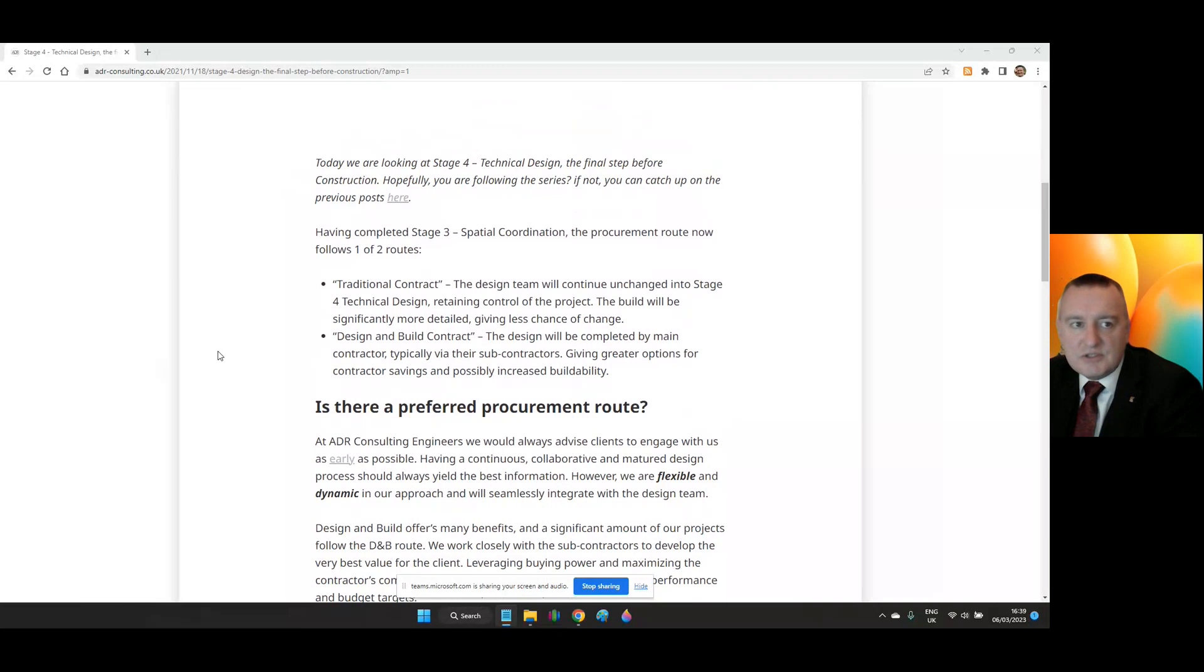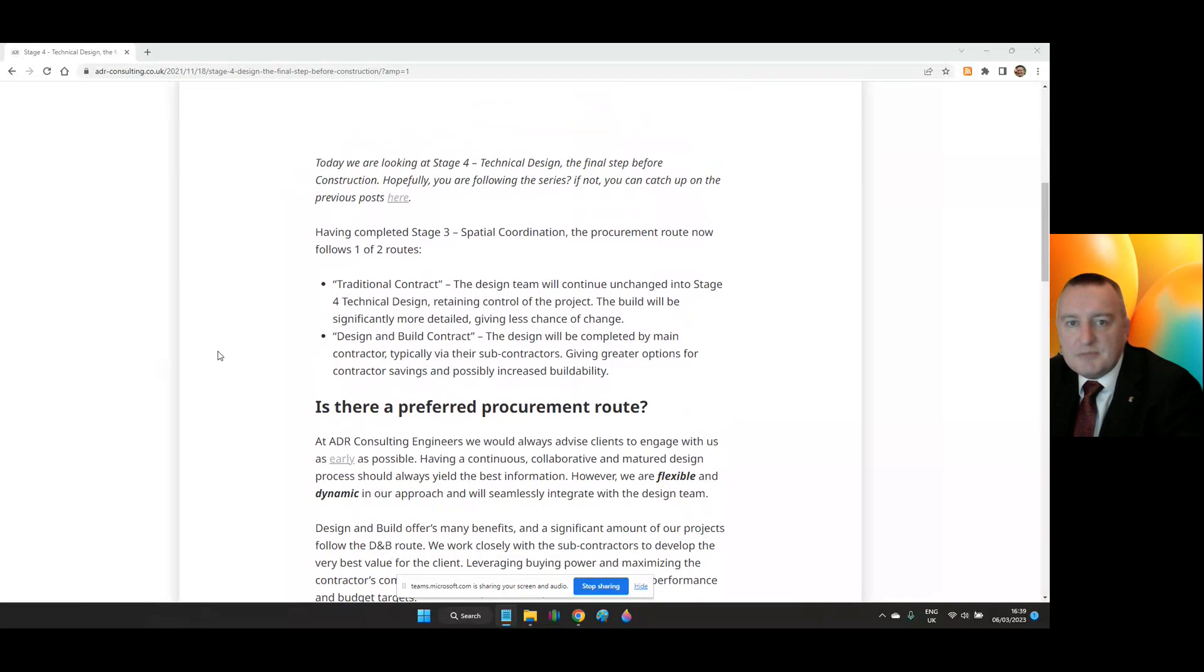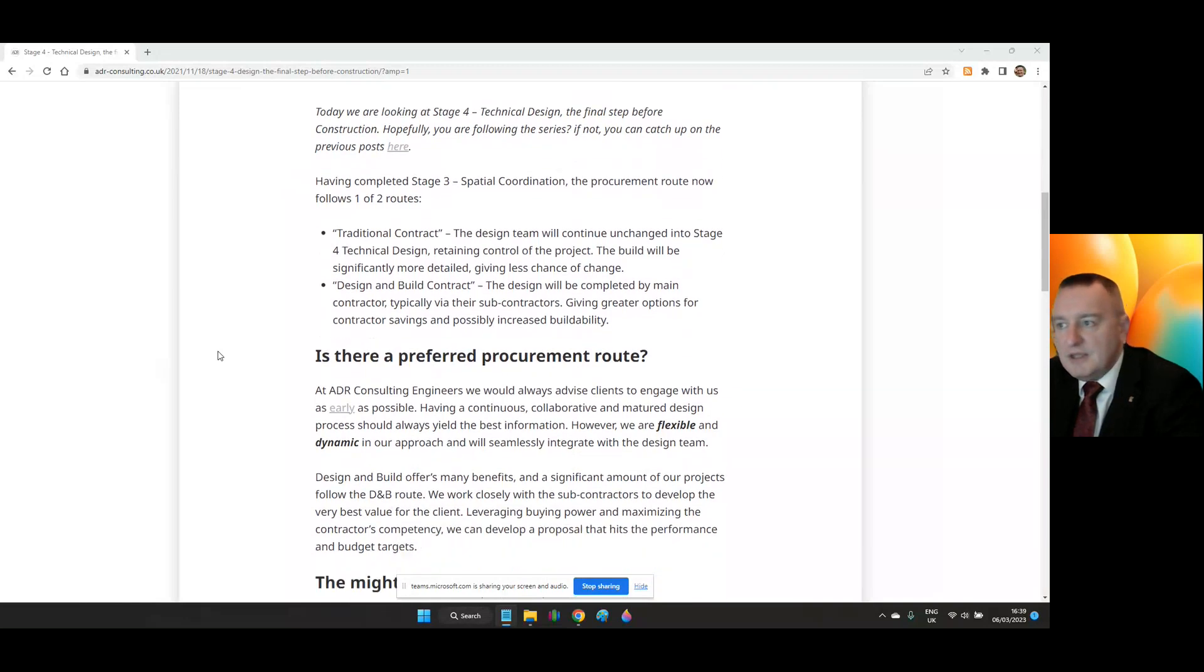Or Design and Build Contract, where the design will be completed by the main contractor or builder, typically via their subcontractors, which gives greater options for the contractor savings and possibly increased buildability.